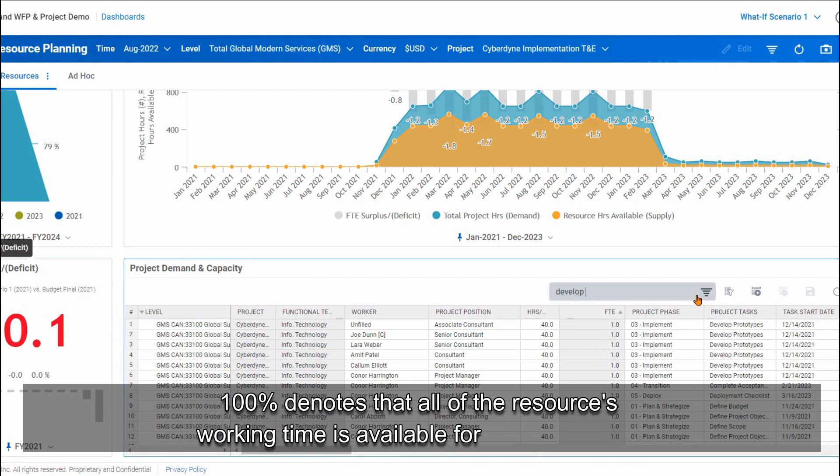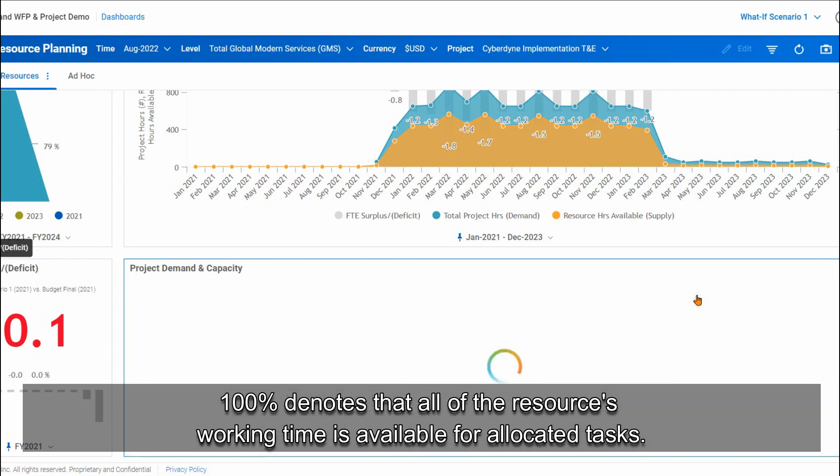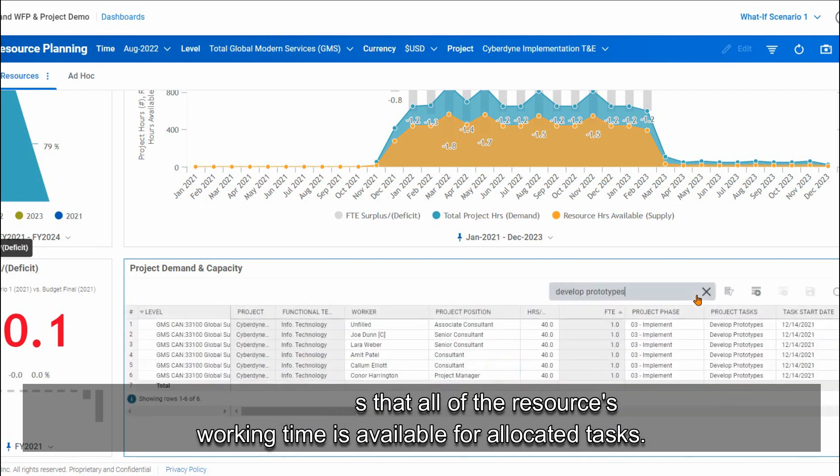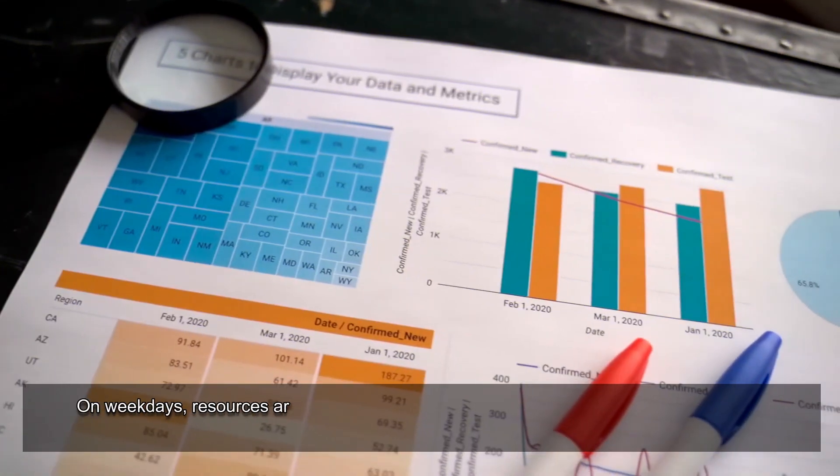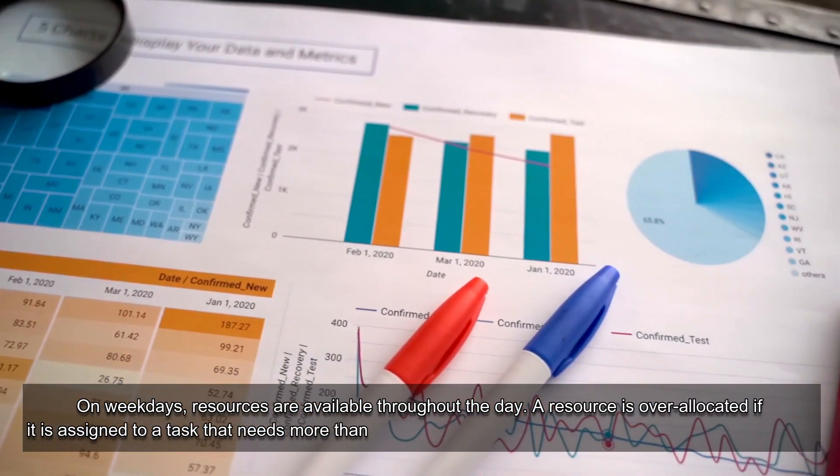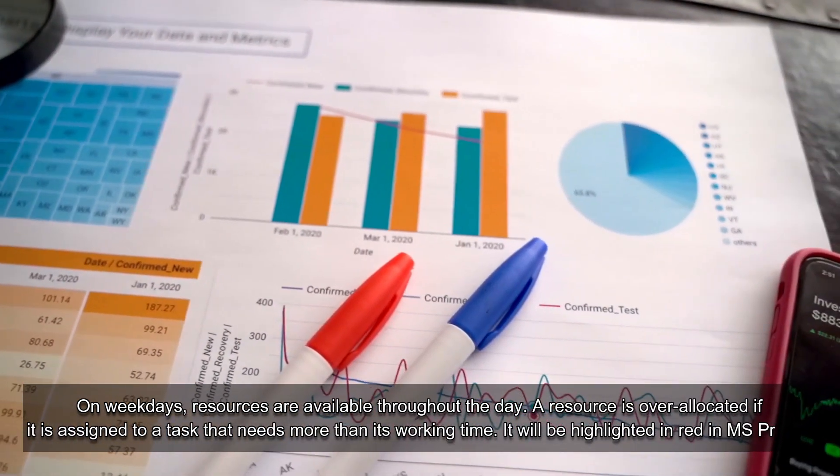100% denotes that all of the resource's working time is available for allocated tasks. On weekdays, resources are available throughout the day.